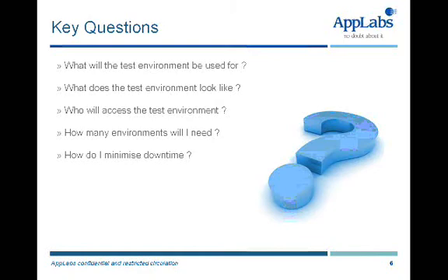Who will access the test environment? Many people will require access to your test environment at different times. It's important to capture this information so that it can be managed and maintenance overheads addressed early in your project plan. For example, if there's a third-party support team involved, SLAs and points of contact should be defined way in advance so you don't get any surprises within your plan.